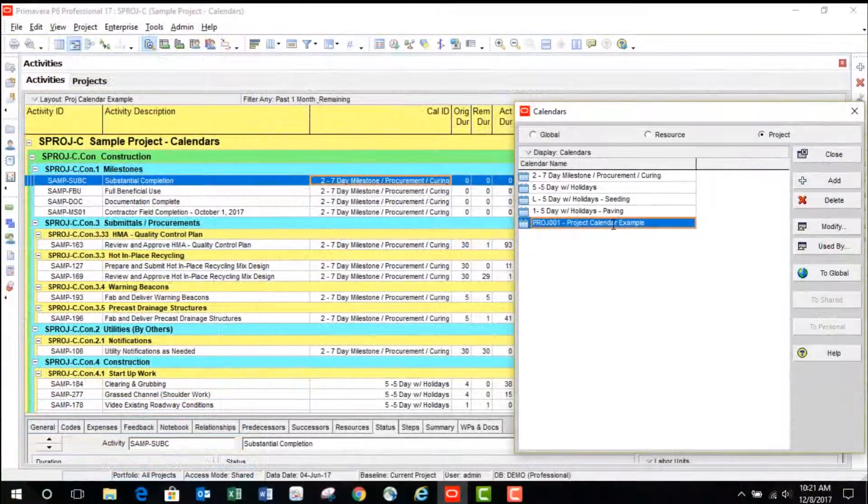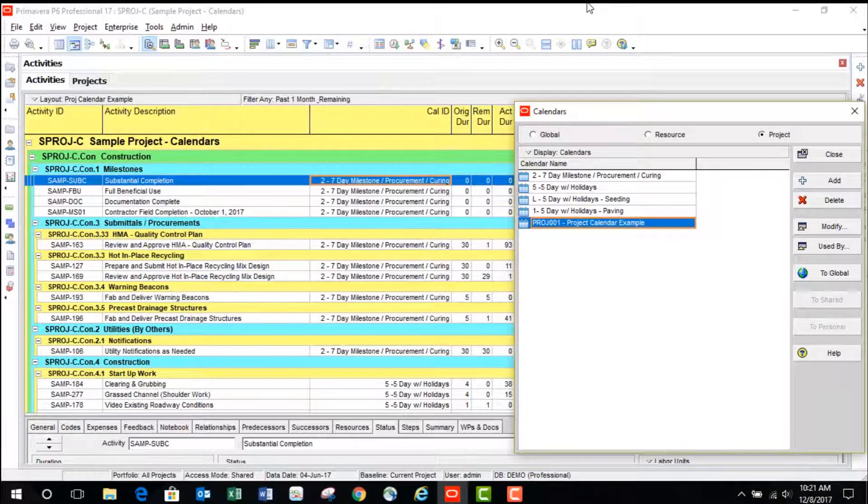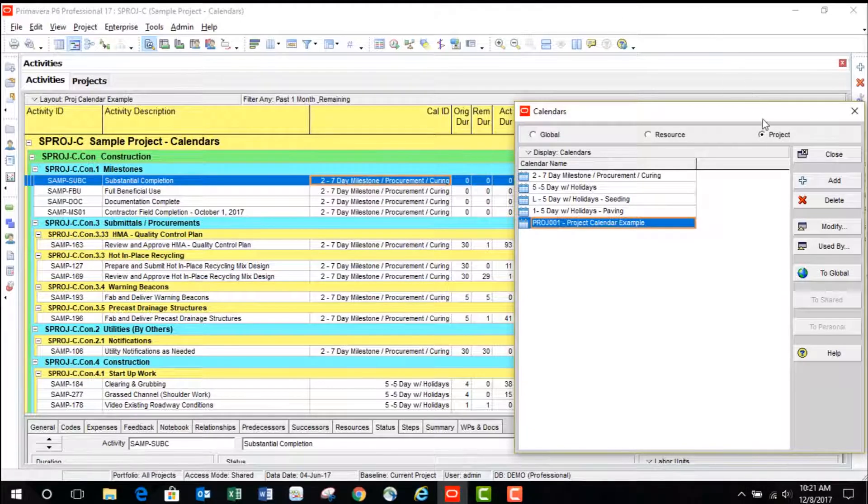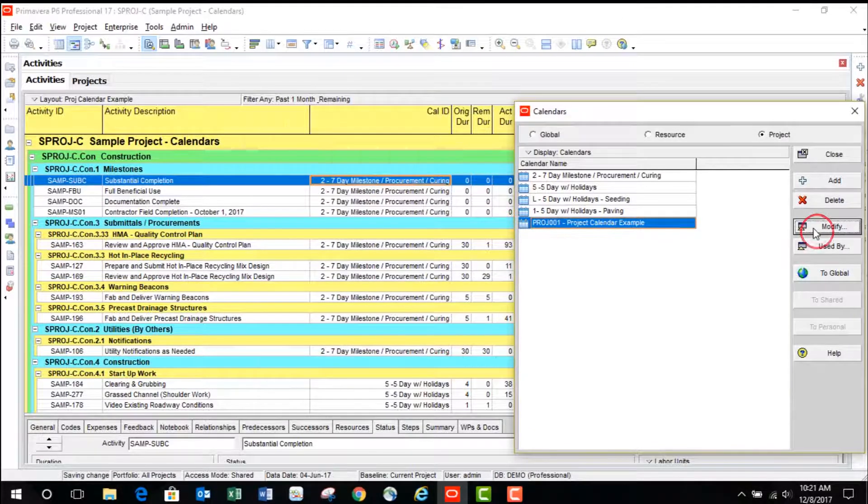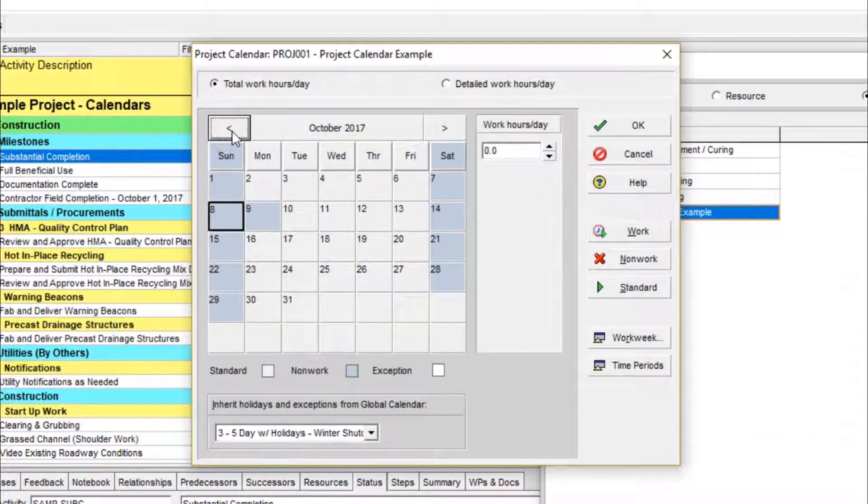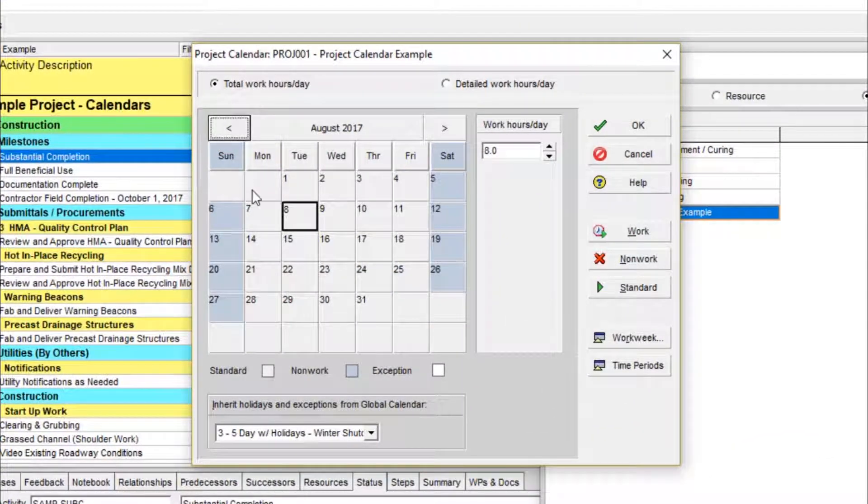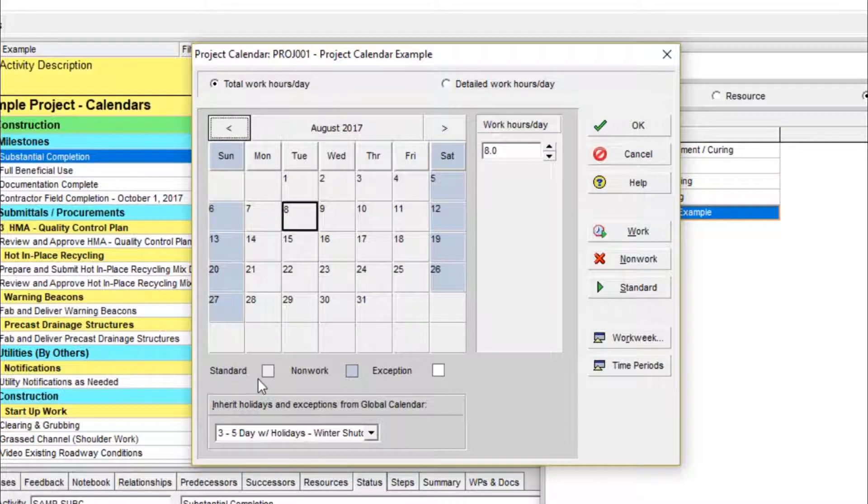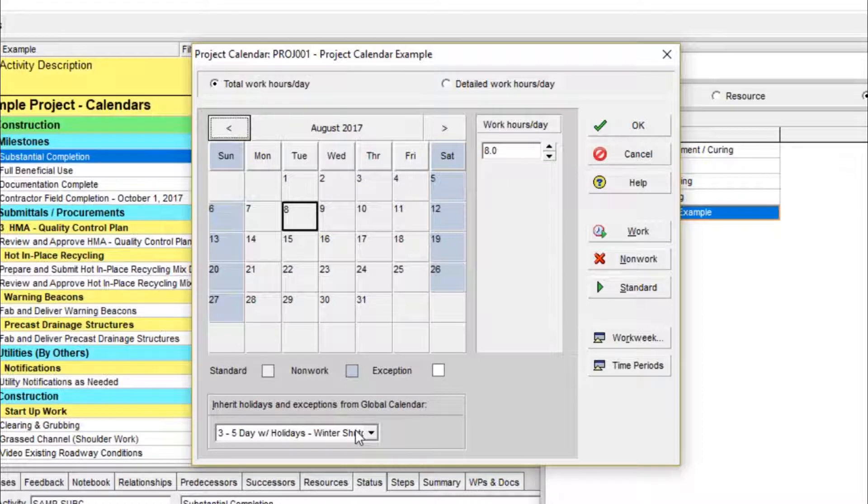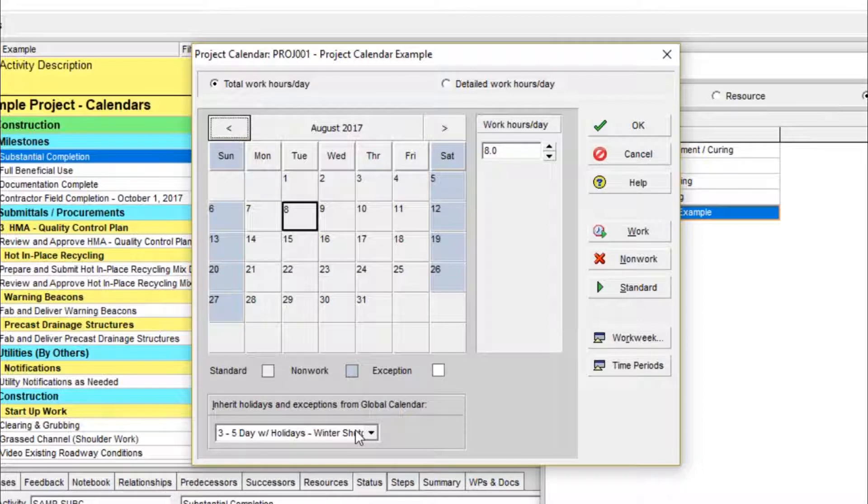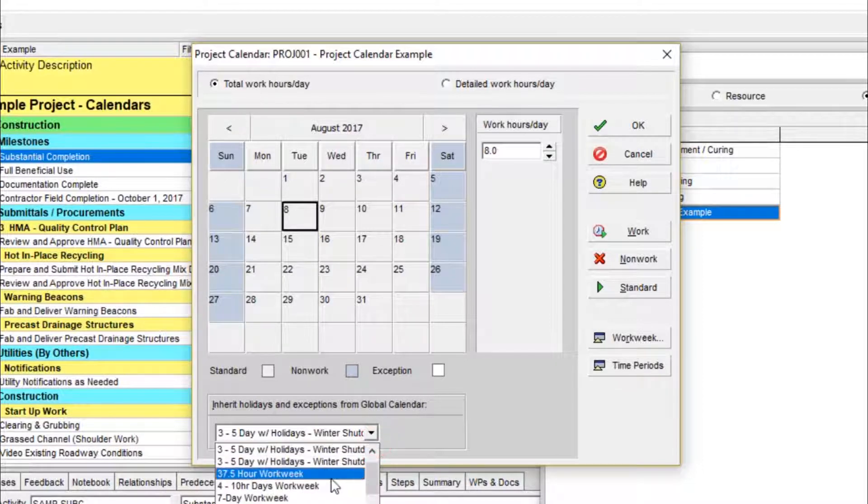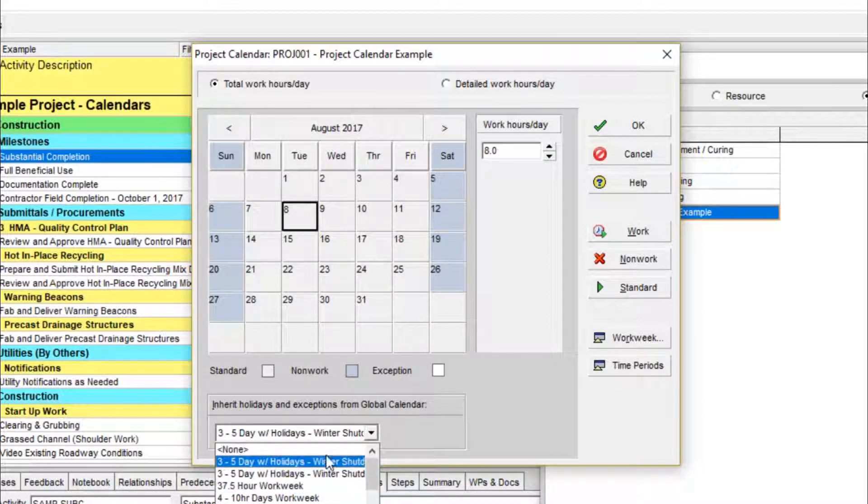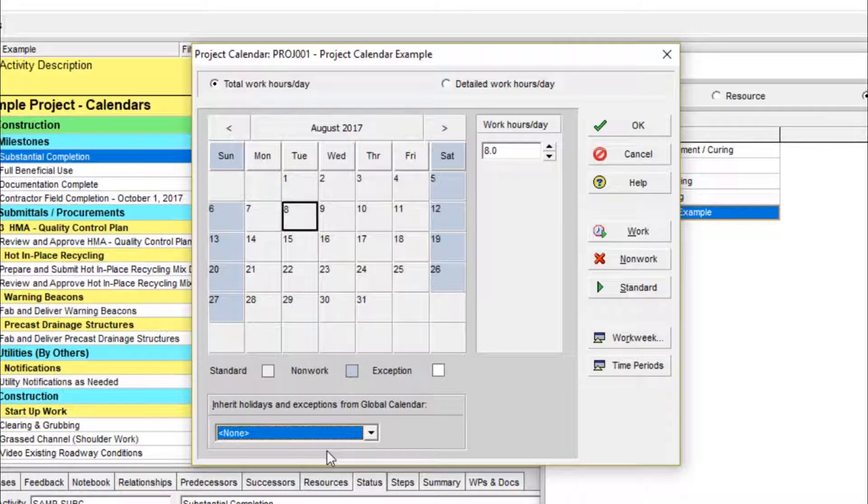Your project calendar is now set up as an exact copy of the global calendar. To check the specifics, click on Modify. Now, it's important to note the dropdown option at the bottom for Inherit Holidays and Exceptions from Global Calendar. This is going to default to the global calendar you used as a template. Any project inheriting holidays and exceptions is still associated with the global calendar. If you have any intention of sharing this file outside of your database, this is a bad idea. Setting this to None will keep your calendar completely independent from any other calendar files and projects in your database.